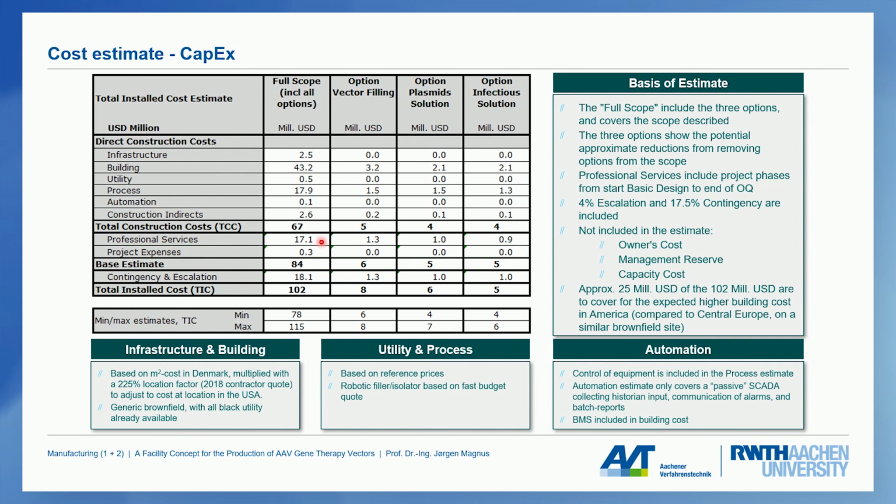So contingency is for all the unexpected costs that you might have during project execution. They can be quite significant. If you have problems with your vendors, for instance, that they cannot deliver on time, or in the worst case, they might go bankrupt during a project, and you end up needing to look for other solutions that would probably cost you more money.